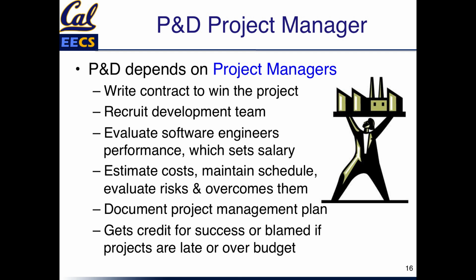This person writes the contract that's going to win the project from the customer. He or she recruits people, new hires or people from within the company. This is the boss, so he or she is evaluating the performance of all the programmers on the team, which affects the salary. And he or she is responsible for estimating the cost, maintaining the schedule. Again, what are the risks and how should we overcome the risks? That's all this manager's job. And then they have to document all this in the management plan. And pretty much the boss gets credit if it's a success and is blamed if it's over budget or late.